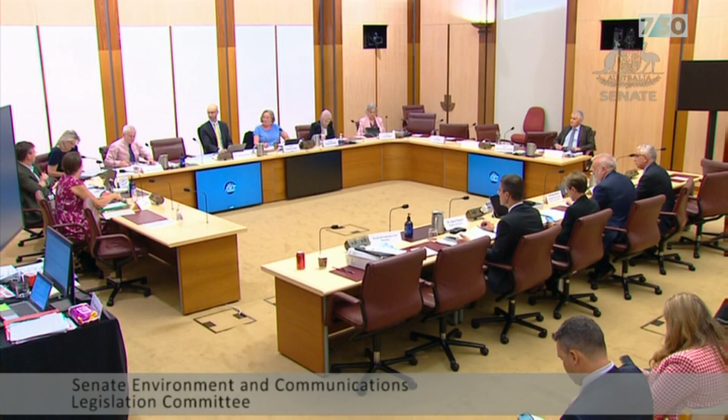You've got a hole through to the surface. There's obviously connection between the tunnelling works and the surface, correct. We have completed 6 kilometres of tunnels and the surge shafts are going well, and there's 5 major work fronts. So the critical path will move around as the project progresses. But until we get the machine ready for unpausing, then we couldn't say that it would delay the whole project.